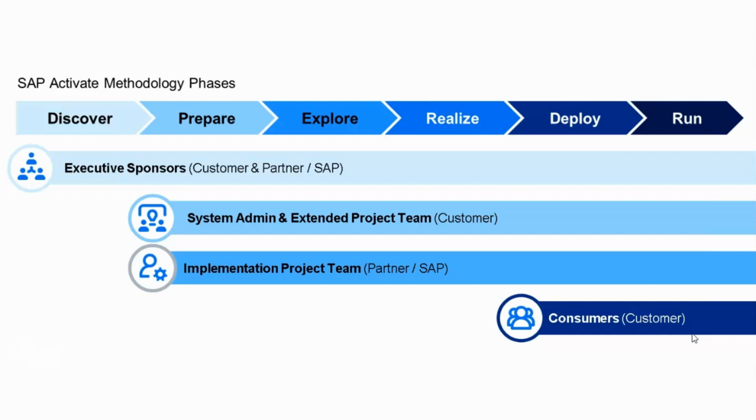The customer system admin should be identified and communicated to SAP as early as possible, so we know who should be assigned the permission role of the IT contact. This role grants administrator access to support applications and the ability to provision the systems purchased by the customer. If one has not been explicitly chosen when the SAP S/4HANA Cloud contract is signed, the signer, the CTO or CIO or similar, will be granted the IT contact role by default. This can be changed at a later point in time.